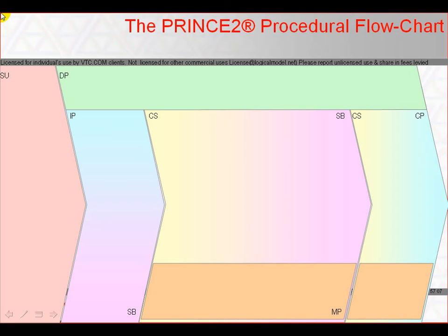The start point of every project is a mandate produced by some members of either the corporate or the program management. It will be produced by members of corporate management for freestanding projects and by members of program management for projects grouped for program strategic benefits. The mandate may be in the form of, for example, a corridor chat, or it may be a document. It might be at the level of, I have an idea that we need to talk about, or it might be so fully researched as to remove the need for any starting up a project activity, and possibly even the initiation stage. The mandate is the triggering input.